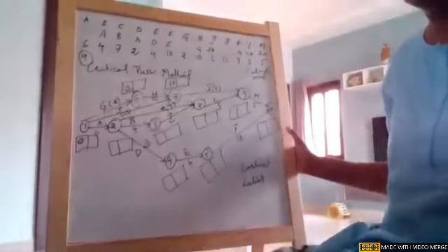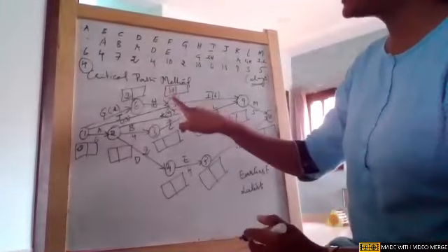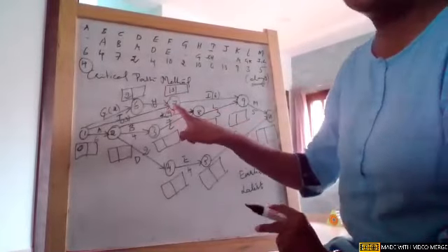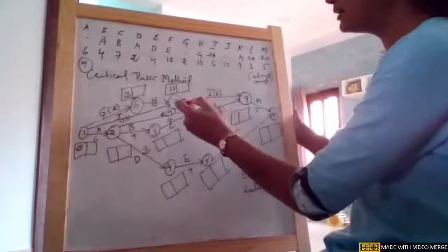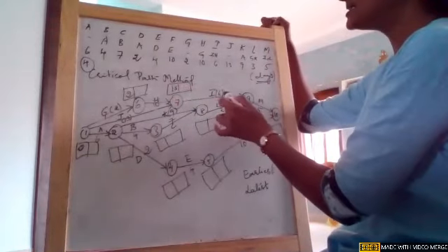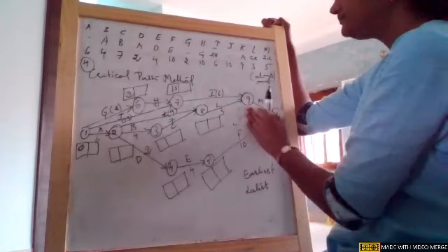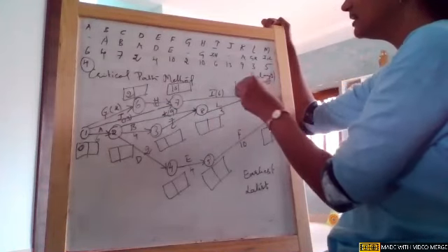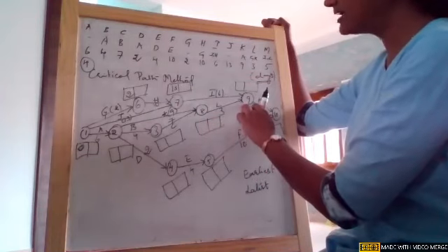Okay, now, so the maximum arrow, whichever, if there are multiple arrowheads, the maximum value, we need to write it. Okay, now again, if I go back here, 13 plus 6, the next node, is giving us 19. Okay, but there is also one more arrowhead.